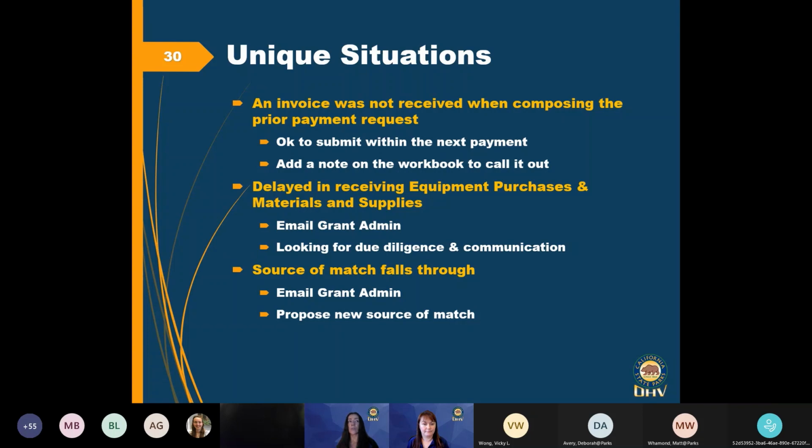If, for a service, for instance, they've already reported in Q1 and an invoice comes in that actually belonged in that quarter, but it just came in after the fact, it was delayed, it was processed late, and now you have it, it came in during the time for your Q2 processing. That's okay, just include it with that second payment request, reporting period.